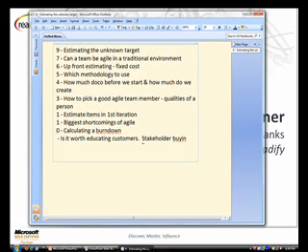I'd recommend doing those properly, doing the Cockburn style of use cases, just because a user story is a great starting point for conversation about a function or about a requirement. But it typically only deals with what the need is and what the UAT criteria are to make it accepted. It doesn't deal with the what-if situations. So I have a requirement that says system must be able to handle a transaction properly. And the UAT, the acceptance criteria, is the transaction is recorded in the database and we get notification or something like that. What are the failure conditions? How do we deal with failure? You typically only figure that out through a use case, right? Because you've got to have all the alternate flows and things like that. So doing that's quite handy.